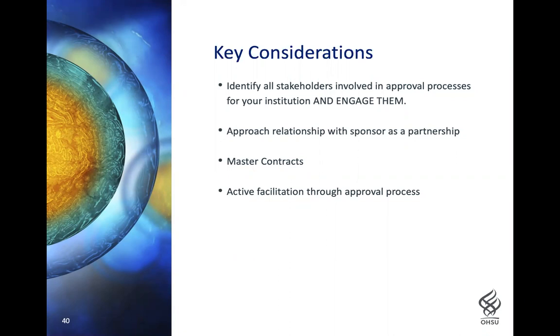Do your best to establish master contracts with as many trial sponsors as you can. This is really key to making sure that those contracts don't get hung up on a couple of words or a few sentences of language that will take your timeline quickly from, you know, the 50-day time mark all the way up to 130-plus days. And last but not least, that concept of active facilitation through your approval process. You really need, as a study team, to support making sure that each step happens in a timely fashion and that someone isn't sitting idle waiting for someone else to do the next step.